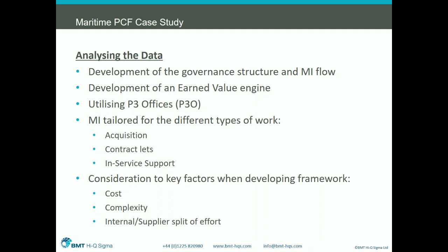The organisation has mandated that all work must be measured using EVM. So we tried to tailor this so that the key project information was structured at suitable levels with due attention and reporting applied, whereas more of these business as usual type activities, such as managing contracts, captured as level of effort and reported at a high level so that we can more usefully track industry performance using EV, KPIs and other metrics that are pertinent to their scope.